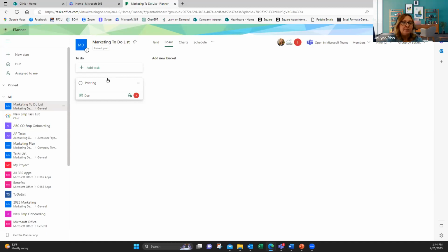Whatever it is that you happen to be working on, you might have 10 other people involved with you on making sure this project gets accomplished. We create a WBS, which stands for Work Breakdown Structure. And basically, we organize the tasks into what are referred to as deliverables and work packages. Well, we can do that same thing here in Microsoft Planner because we can organize our tasks into buckets. It's like putting things into a category or a deliverable where everything related to it is going to be underneath it.